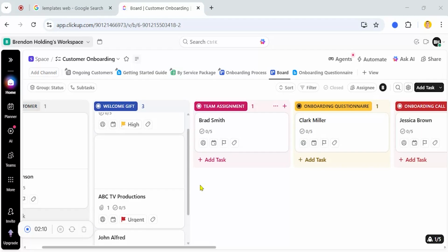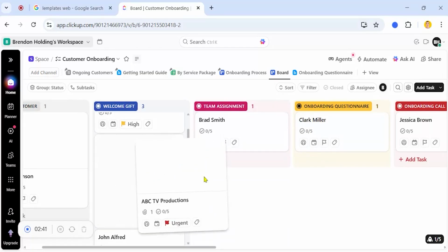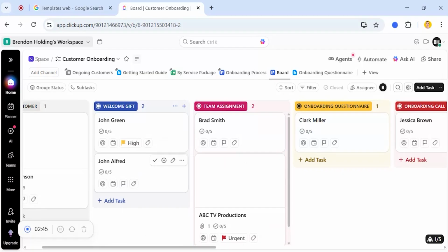Another clear problem is unclear ownership. When a card belongs to everyone, it belongs to no one. You'll see tasks sitting untouched, comments instead of action, and work waiting on invisible decisions. Even in the Kanban system, someone must own each step. Ownership doesn't mean doing everything. It means being responsible for moving the card forward. Without this, handoffs slow down and accountability disappears.